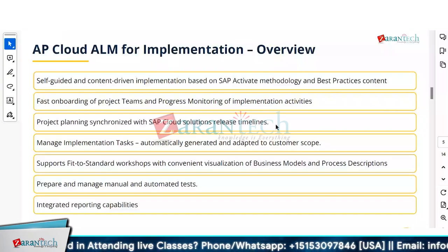Let's suppose you are in your SuccessFactors implementation, right? And maybe mid-May there is a patch update or release planned for SuccessFactors. SAP will do it, right? They're not going to wait for you, they're not going to stop it. It's worldwide, broadly, right? So then you can plan accordingly, maybe some testing after that, to check whether the work I've done till now gets impacted by the update or the release, right?